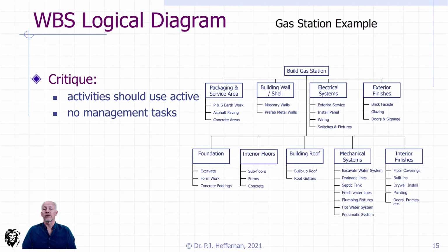And I noticed that there's no management tasks laid out in this particular tree. So there probably needs to be a subtask called project management, and that should allow for a number of tasks which can be integrated into all of these other tasks.